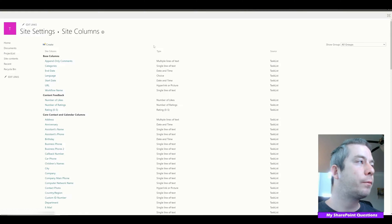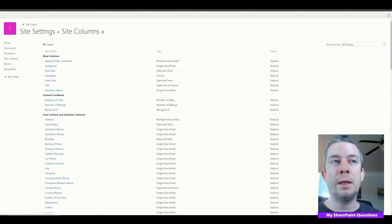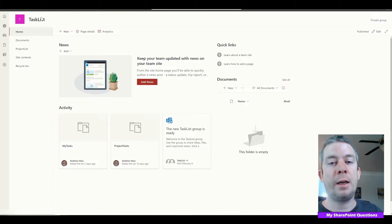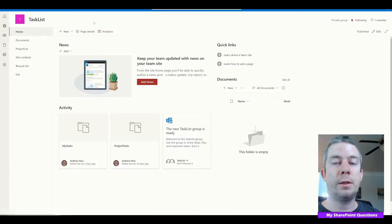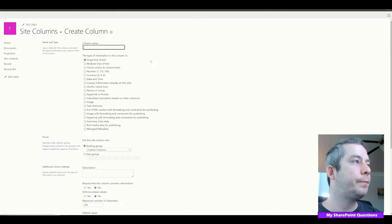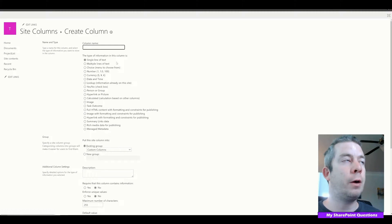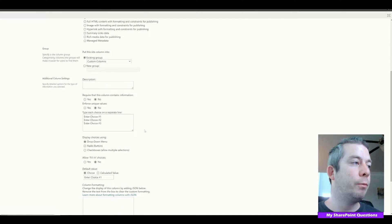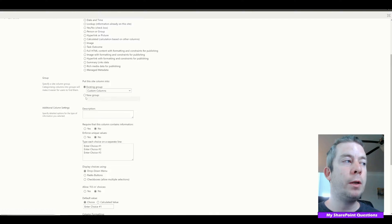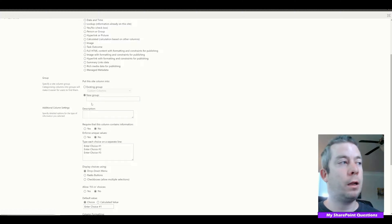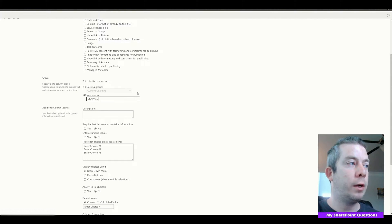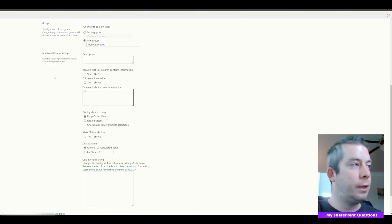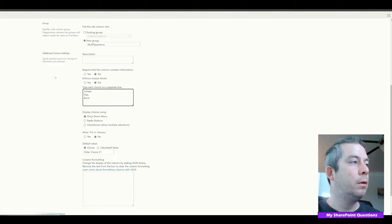We're going to create some site columns. These site columns are associated with the site collection — my site collection is called Task List. All the sites that make up this site collection are associated under Task List. Let's create a column called Project Phase Choice. This is going to be under both content types. We want to be consistent and organize the columns, so I'm going to put these under my SP Questions group. This is a choice field with values: Initiate, Plan, Build, Run, and Close. The default value is Initiate.